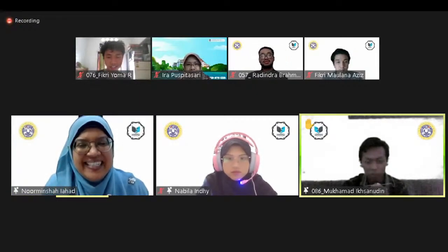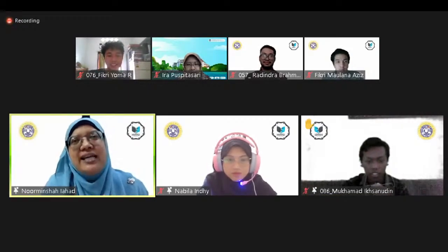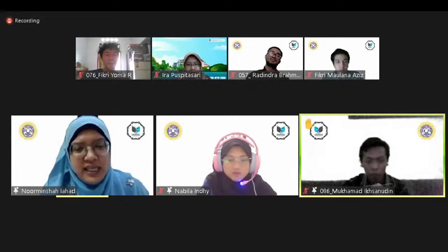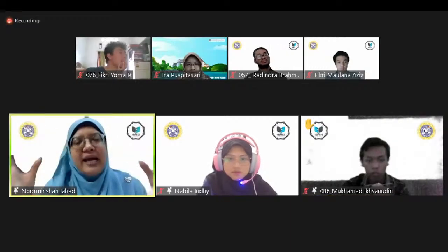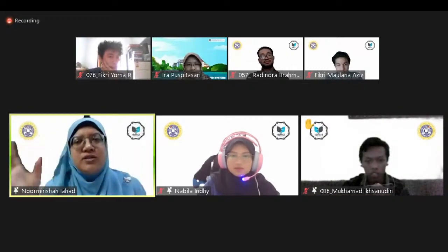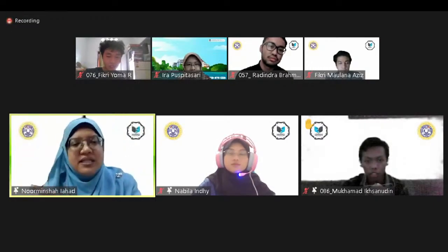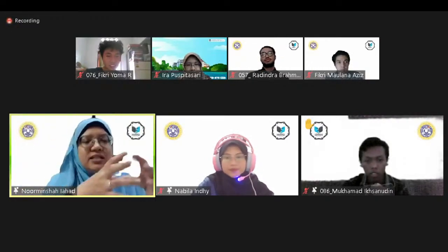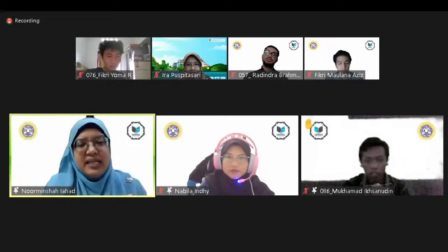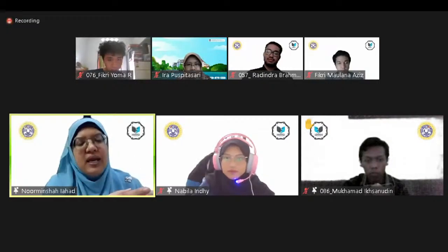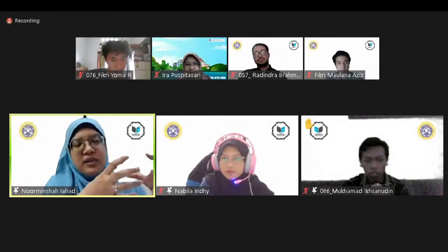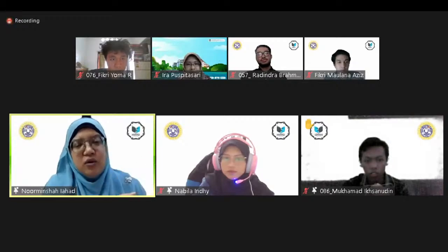Yes. Second again. So it's not that we have many plans for the whole thing, but remember we have backlogs. Backlogs refers to all the user requirements. We divide the user requirements into small pieces. So user requirements group A is sprint A. For sprint A, we have its own planning, its own design, its own testing and so on.